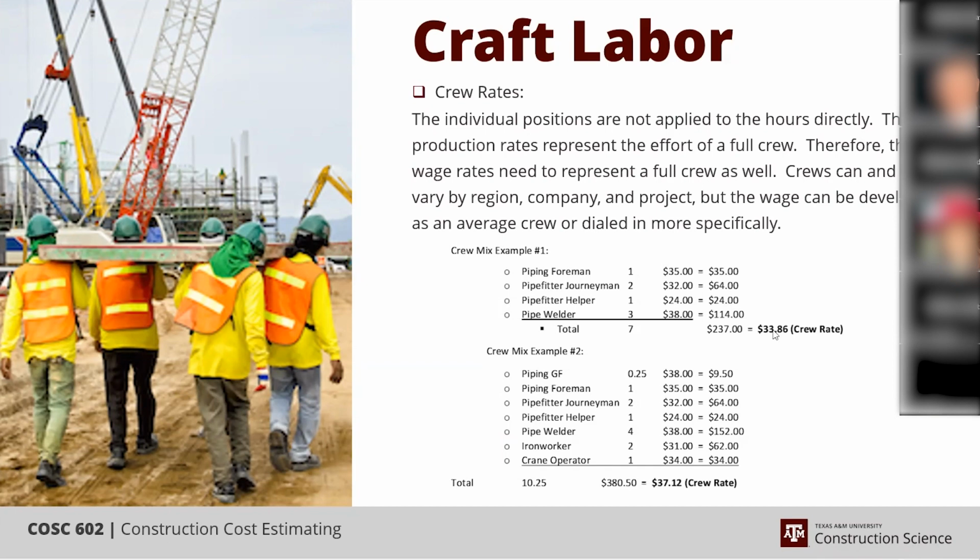Yes, it's just a true cost. The burden is a cost, right? It is. And so it's kind of a debate, just like there's a debate: some companies say crane operators are an indirect, like the equipment. Others say they're a direct, like the people turning the wrench. And others say they're a direct non-progressible because they're a direct cost, but not directly associated with installing that item.